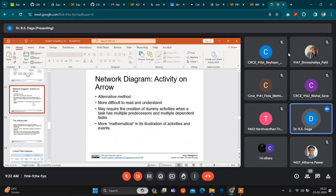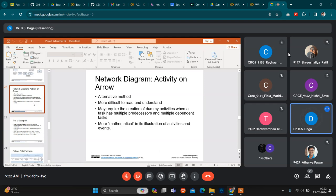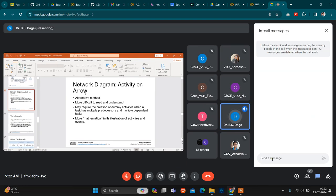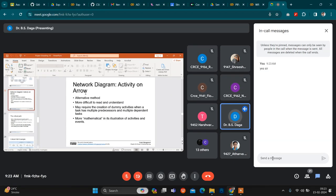There are two ways the network diagram can be represented. One is the Arrow Diagram Method and the other is the Precedence Diagram Method. In the Arrow Diagram Method — activity on arrow — the arrow is labelled by the activity. The tail of the arrow represents the start of the activity and the head represents the finish of the activity.